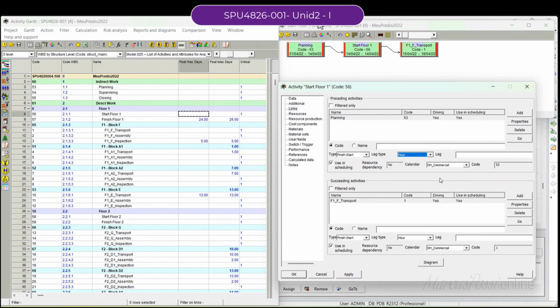If you have 100 meters to paint, the next activity will start after 50% of the volume, not 2 days after, but just when 50% of the volume is achieved. Which is more realistic with projects. When you decide to paint a room, and the next activity is fixing some panels, you have to wait for the paint to dry.